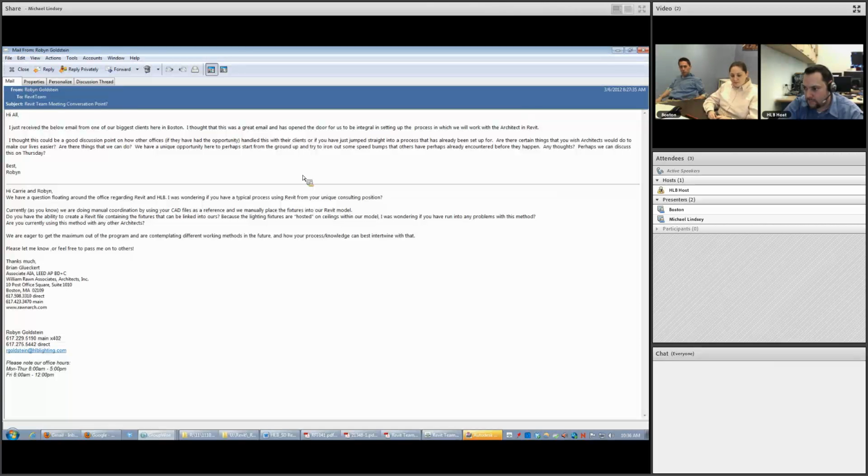So I think one of the things, how did they respond when you had discussed the scheduling and model uploading and background releasing? How did they respond to not necessarily the pushback, but the recommendation of, look, we've been in situations where we have weekly, bi-weekly uploads, and it seems like the team is always chasing their tail, and there's not a coordinated design. Our recommendation is to really have milestones where things are frozen. How did they respond and receive that recommendation?